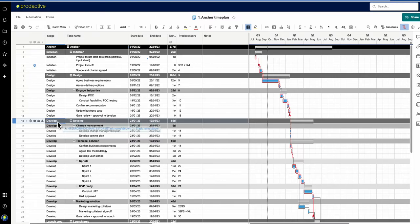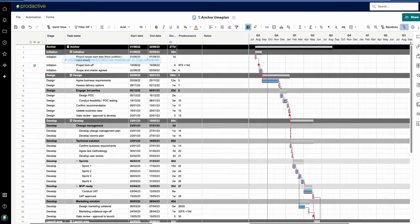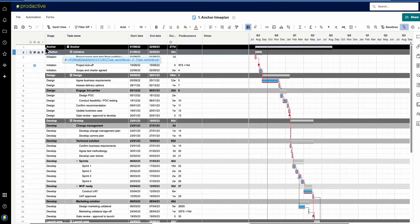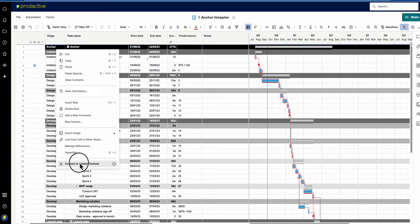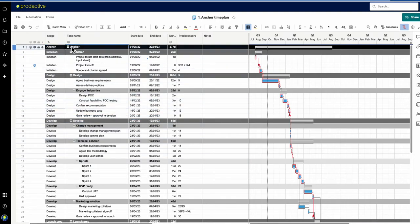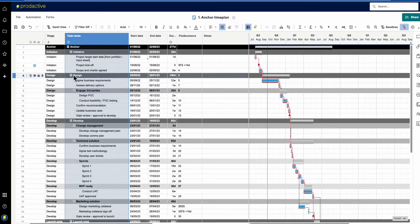By putting this formula in with the IF ERROR and task name at row, I can now turn this to be a column formula. This formula has now applied to everything, so all the tasks throughout this project time plan will always have the right stage name.